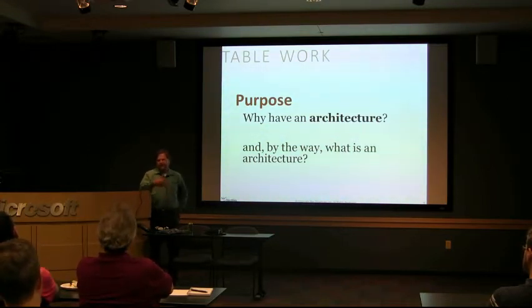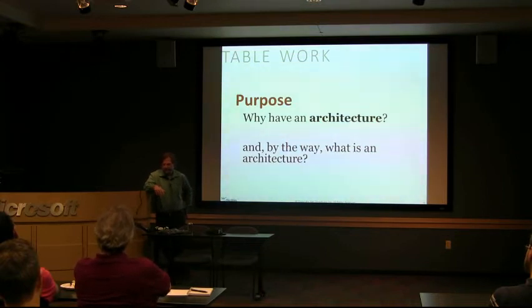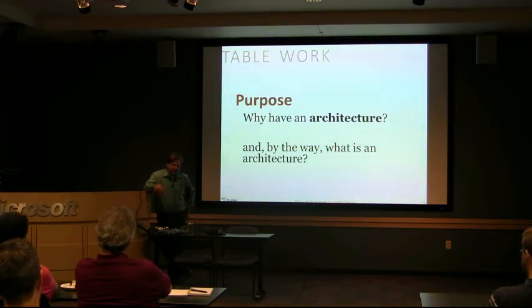Okay, in the agile community, we now talk about 1 week, 2 week iterations, or maybe even no iterations. If you're just looking at flow, you should be talking about things getting done in 1, 2, 3 days. Started, done, started, done, started, done. It's kind of, I think, some bastardizations of process now, or incomplete process now. But if you're in Scrum and you're doing 2 week iterations, you should definitely have like 1, 2, 3